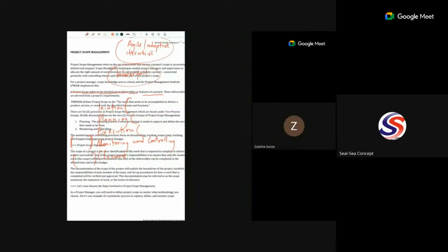For example, if what I need to do for the customer is to erect a building, after we have done the design of the building, that's the design of how the building will look like. Is the design of the building tangible enough for us to present to the customer so that he can check if he's okay with the design? Yes. It's an absolute yes. The design of the building is a tangible achievement in the course of erecting a building. So this design, we can call it a deliverable in project management.